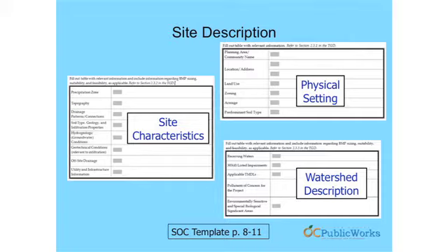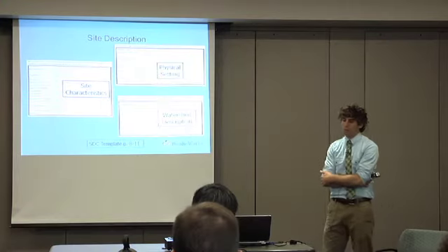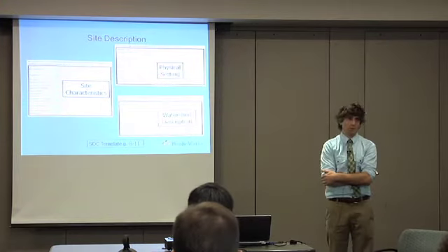There needs to be an elaboration on what those geotechnical conditions are, what investigation has been done to clarify that those exist, and most likely what we're going to need to see is something attached to the document, a geotechnical report of some basis that's been approved, that's been prepared by a professional, and provides a technically defensible basis for that determination. That's just one example, but we're going to need to look for more in this.